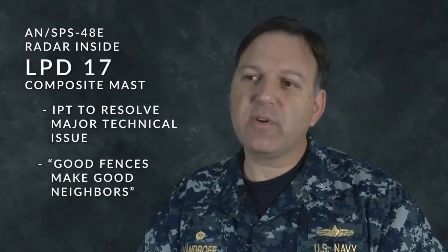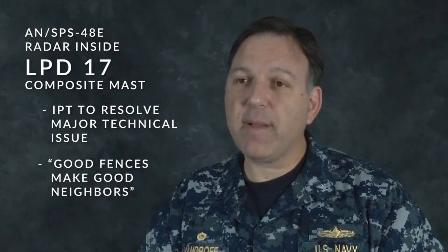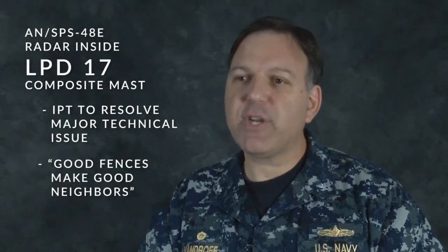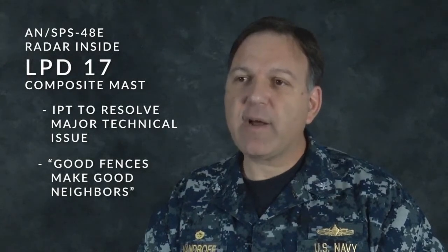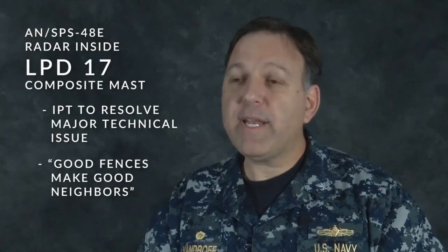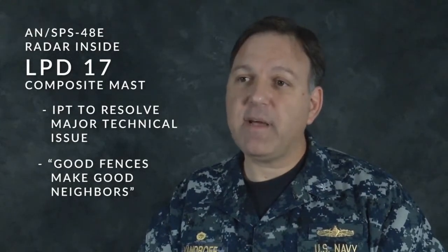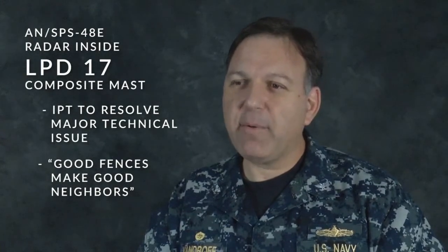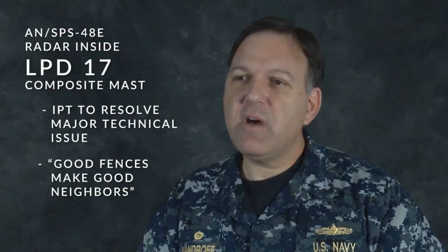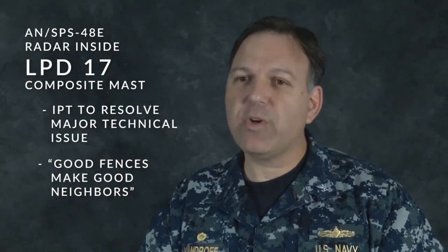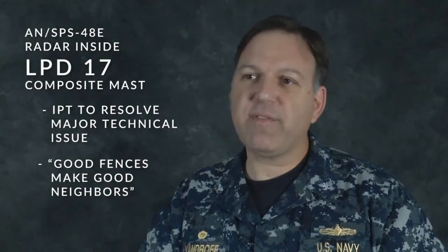Another example, smaller, but at a more junior level, when I was earlier in my career in the LPD-17 program. We had a classic PARM technical problem that was a PARM ship interface. The SPS-48 Echo radar, which is a 3D air search radar that the Navy had used for many years, was put in the brand new composite mast of an LPD-17. Modeling and simulation had only gone so far at that point. There were unknown technical challenges in putting that radar inside that composite mast that weren't known until we actually sailed the ship for the very first time.